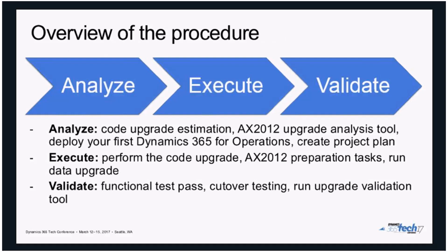Existing databases usually are too big, and for most customers, your downtime window is just a weekend or even less than a weekend. So in order to successfully upgrade your current data and ensure that you have a reliable way to upgrade, you cannot just do like in Microsoft Office, click next, next, next, next.